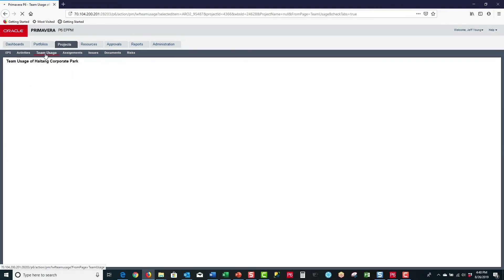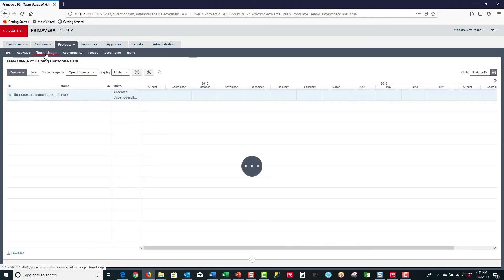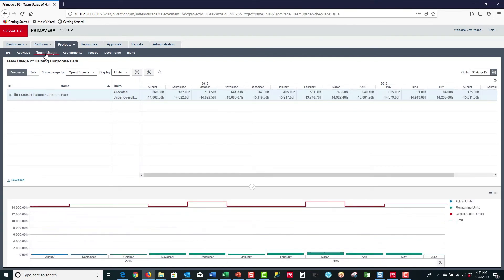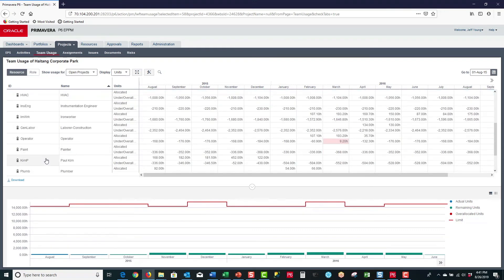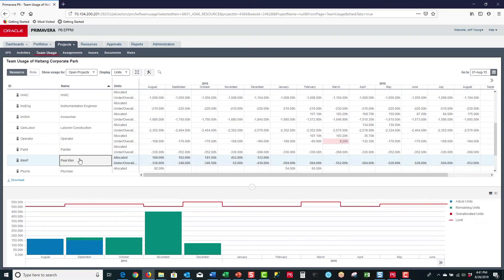Then I come to the Team Usage page. The Team Usage page allows you to view the usage of selected resources on an open project and display a spreadsheet and/or histogram to see the levels of usage. If I choose to expand and scroll down, I come to the resource Paul Kim. I can see how his work has been progressing and how it's planned for the future. The blue bars are his actual hours already worked, the green is remaining work, and the red is the limit line — the limit he's supposed to work. If his allocations go above the limit line, they will appear as red histogram bars, showing him to be over-allocated.